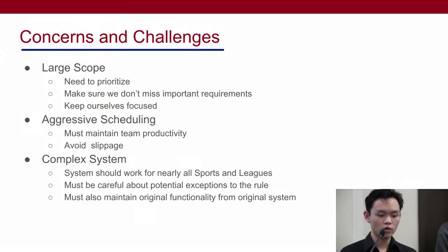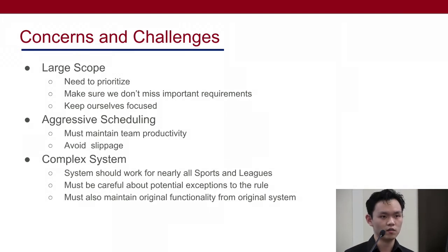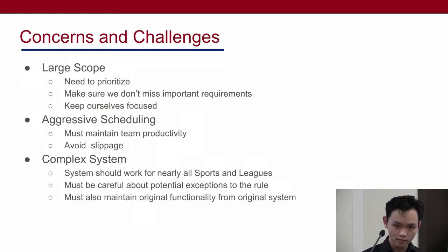And in order to ensure that we deliver the features that we're supposed to, we have committed to an aggressive schedule to maintain team productivity. However, this means that we need to be careful about potential slippage. Any slippage is quite dangerous, as slipping behind on an aggressive schedule could lead to even more difficulties further ahead, which we have mitigated by ensuring that we are prioritizing the most important work to be done first.